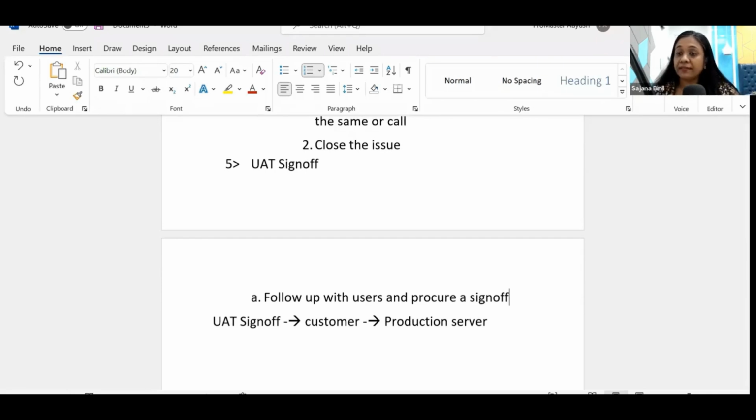Without a sign off, guys, the code cannot be deployed in the production environment. So typically, as a best practice, through my experience, I had a clear idea that the UAT users usually keep all their work towards the end of the UAT phase. Okay, if you give them 2 weeks for testing, you will see that only in the last 2 days maximum UAT users are testing. For the entire 2 weeks, nobody is testing the application.